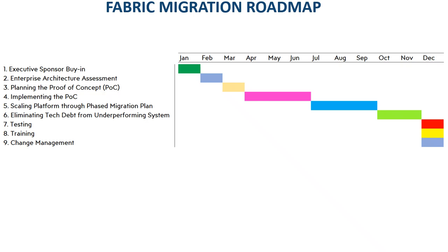And finally, number 9, change management. We drive organizational adoption by communicating the migration benefits, timelines, and impacts regularly. Change champions are engaged to help manage resistance, and feedback loops keep adjustments responsive. Continuous support and adoption tracking ensure the platform's successful use over time. Deliverables include the change management strategy, engagement documentation, adoption metrics, and ongoing feedback reports.